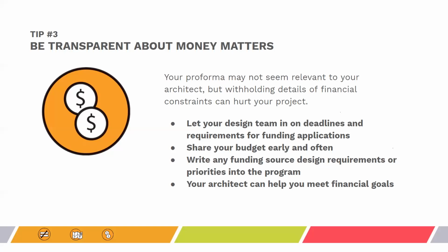So if your architect isn't contracted to run the bidding process, your contractor could be making incorrect assumptions that would result in big change orders down the road. So we think this is really important.